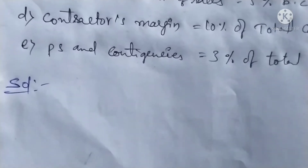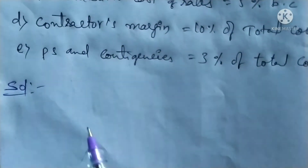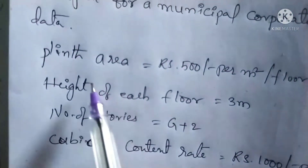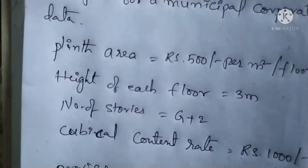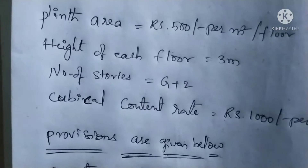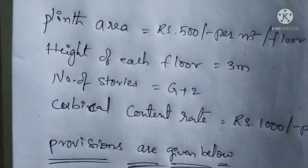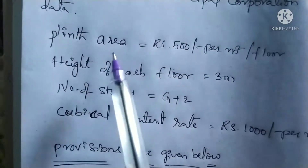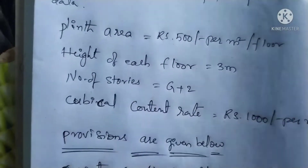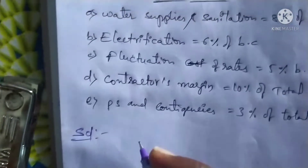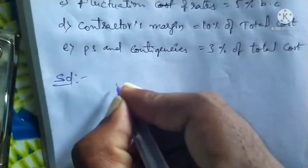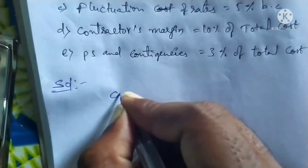PSN contingency charges is 3% from total cost. Now let's start the solution. First of all we have to calculate the cost of the building. The cost of the building is calculated from the formula: cost of building equals cubic content rate multiplied by cubic content.